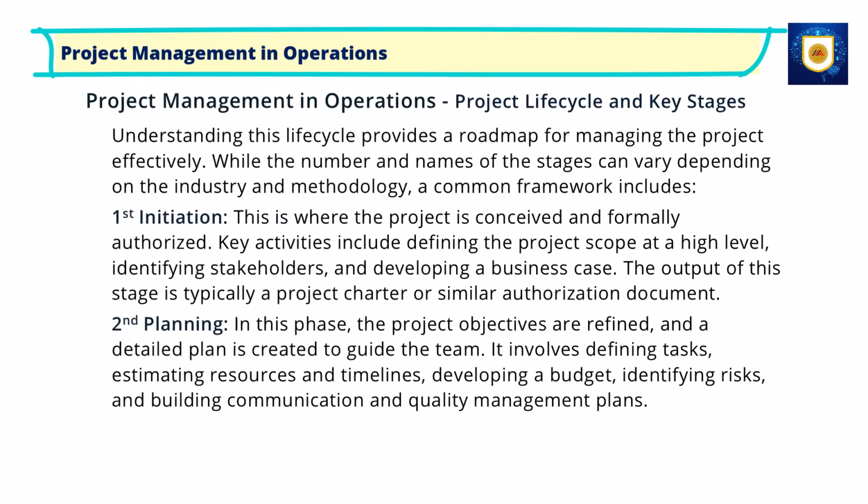Project lifecycle and key stages. Understanding this lifecycle provides a roadmap for managing the project effectively. While the number and names of the stages can vary depending on the industry and methodology, a common framework includes: First, initiation. This is where the project is conceived and formally authorized. Key activities include defining the project scope at a high level, identifying stakeholders, and developing a business case. The output of this stage is typically a project charter or similar authorization document.